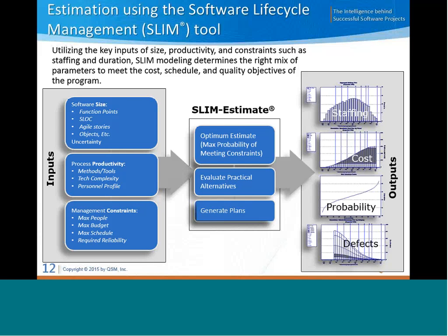And we can do that also for ERP projects. We translate the number of configurations into a size and implementation units. So we quantify the size, and then for process productivity, what we usually do is we start with an assumed productivity based on an industry trend line or on historical productivity within the client environment.